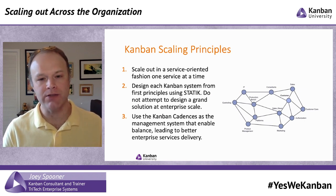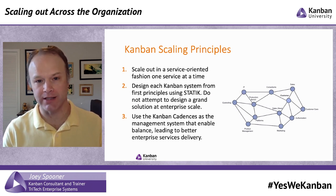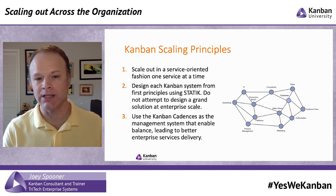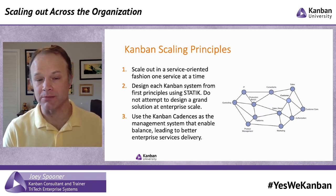From there, we get into the demand analysis and the capability analysis that starts to build out what kind of work they're dealing with. What's the pattern of that work, the demand pattern? How well are they supplying that demand with their capability? Then digging into the workflow and getting into the policies of how this thing should be put together, and ultimately the Kanban design itself. And that's just for one system.